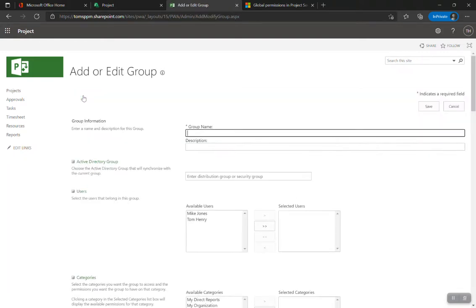I don't touch the out-of-the-box stuff — leave that as is. If people were using SharePoint security mode, switching them out would kick them out right now, so you'd have to add them to your new group. It's a good idea to do this over the weekend. I'm going to create a new group — let's say I work for Microsoft, so I'll name this 'MS Project Managers'.